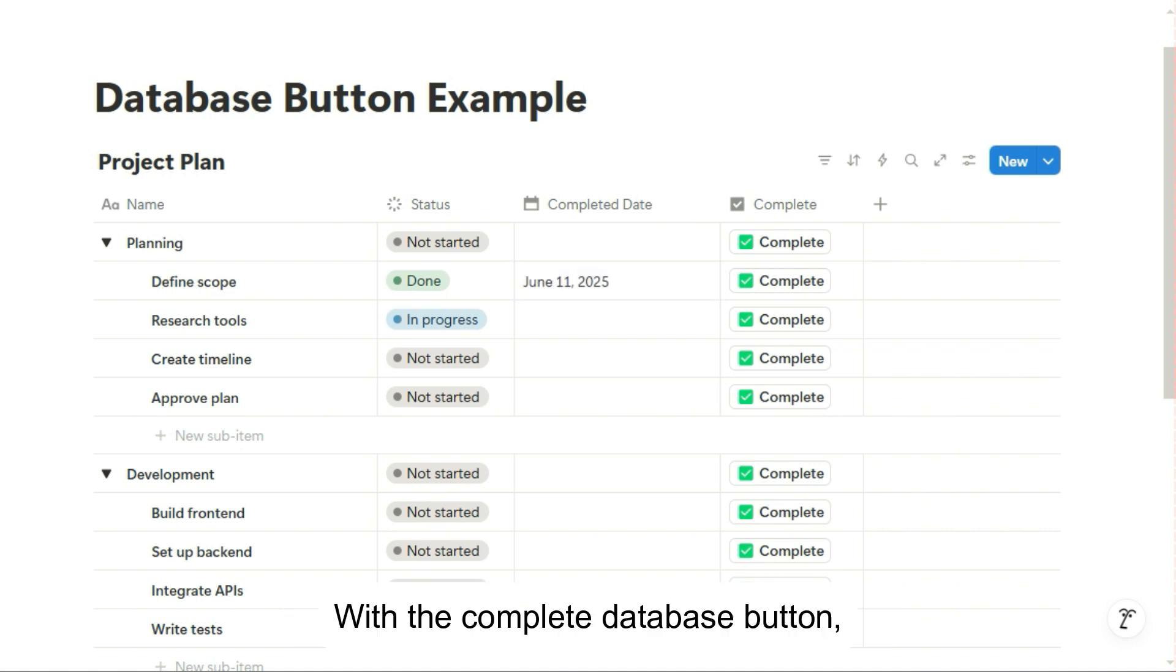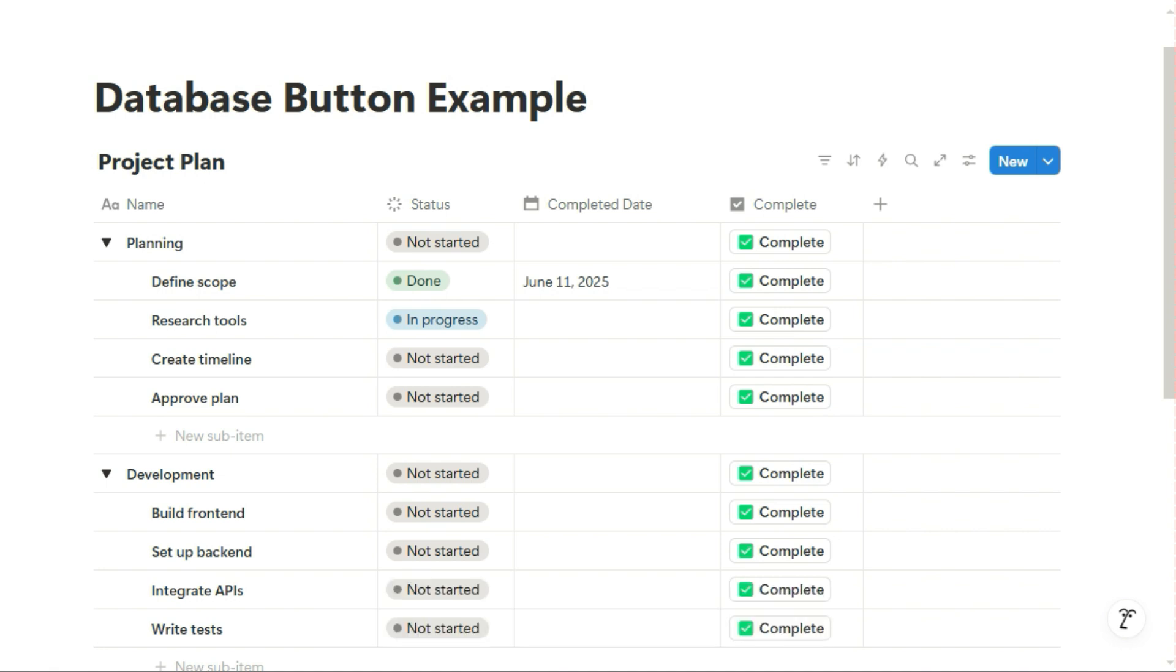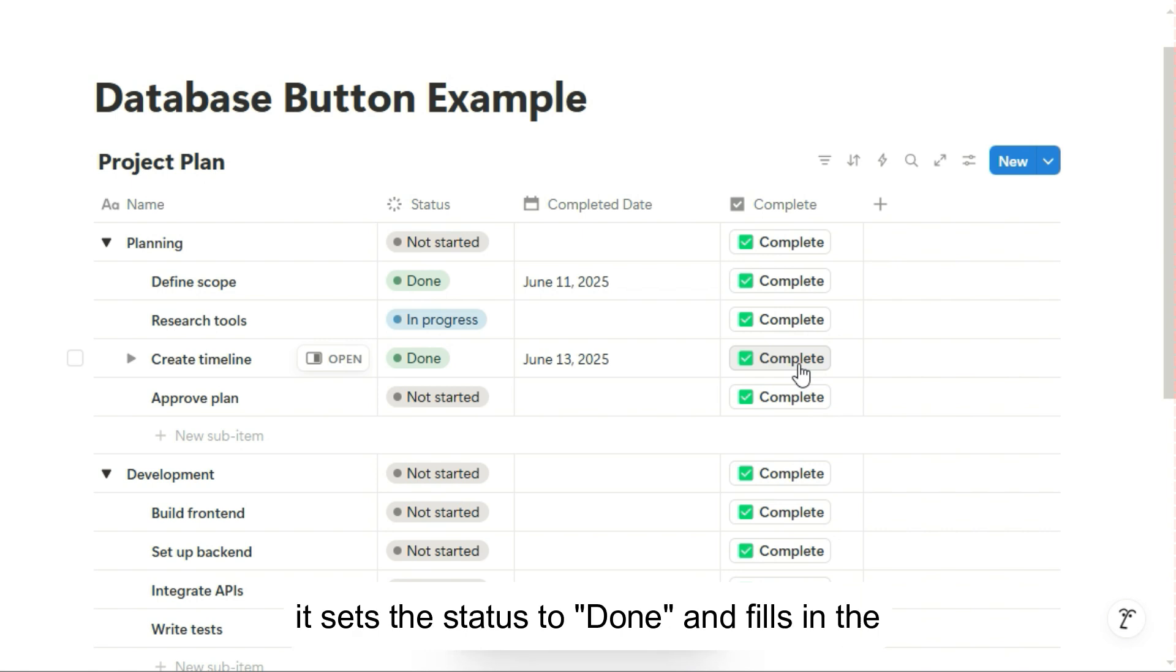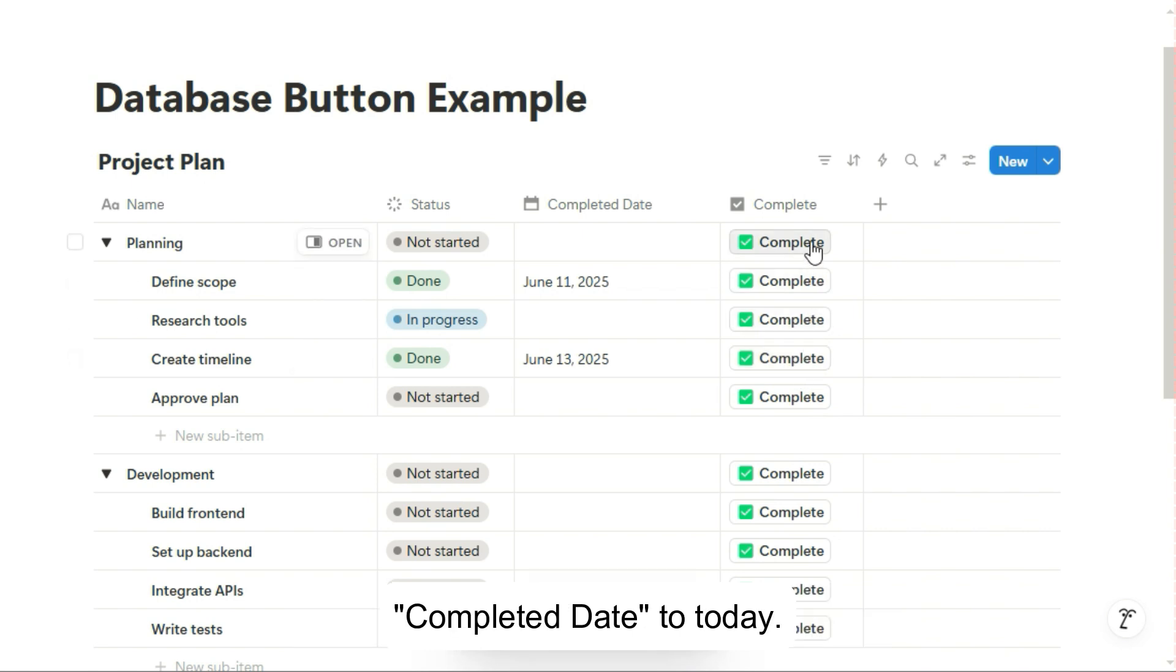With the complete database button, here's what happens. When you click on it in a sub-item, it sets the status to done and fills in the completed date to today.